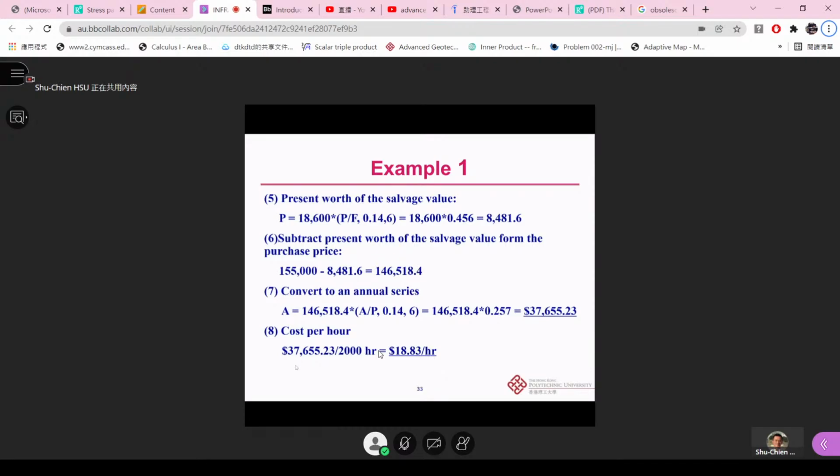Remember that for these kind of construction equipment things, like for the cost estimation, usually we were gonna convert it to the hourly rate. Yeah, so that we can easily compare and easily know that, okay, once we use this equipment for 1 hour, what will be the expected cost that we're gonna pay, all right?